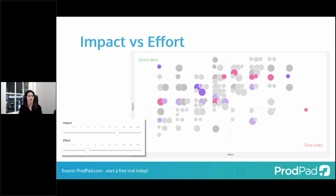And the other key thing is that when you're estimating effort in this way, assume that it is an estimation, but also look at the entire effort, not just the effort of the developers. I think a lot of teams get stuck thinking about how much effort it's going to take the developers to build something. It might take no effort at all to add a button to something, but it might take a lot of effort to actually get it launched or legalized or get it past marketing, or to support and maintain it, whatever that button is meant to actually represent.